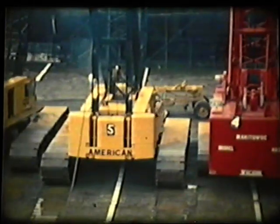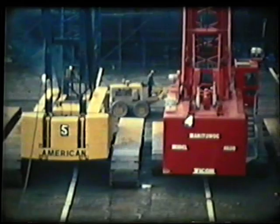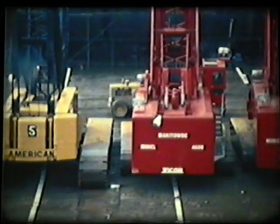Under each crane, the marked guide boards would give the position in the slow trundle forwards as the frame was raised. As was to prove the case so often later, the lift or roll-up started at dusk, ran into nightfall, and was then held until morning for the main part of the action.